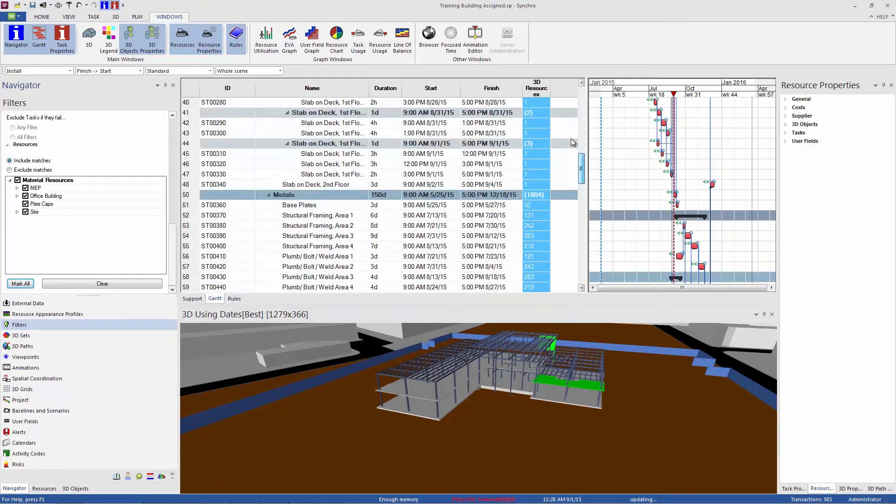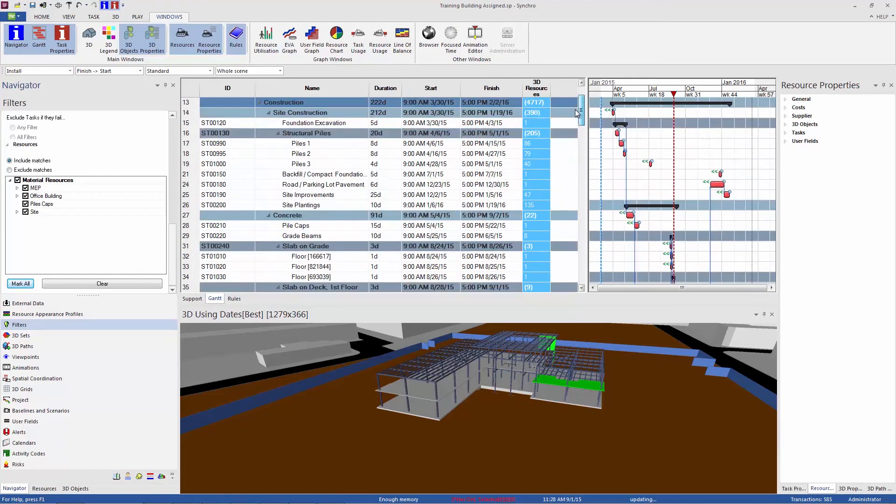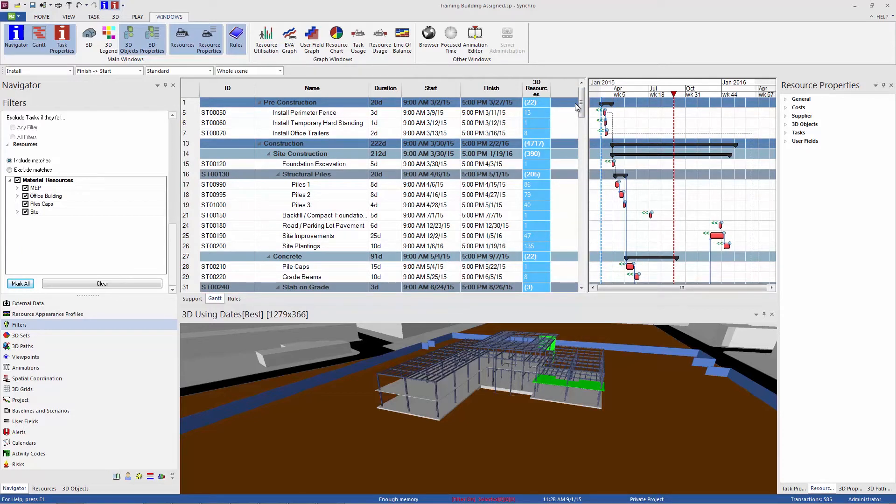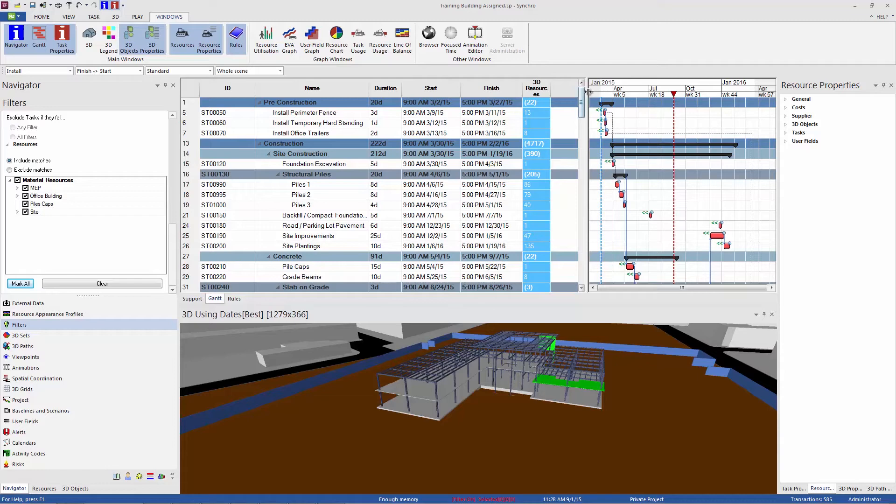So tasks that don't have resources, material procurement tasks, handover tasks, inspections, things that don't have 3D objects associated with them are not going to show up in this list. So now we're just seeing tasks that do have model objects associated with them.